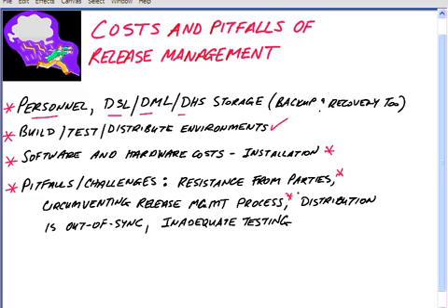For example, one business unit or one area releases the software or hardware weeks or months in advance of another business unit that can cause political problems, morale problems, personnel problems. And of course, the biggest pitfall of all is simply inadequate testing. You cannot test enough. You cannot create a too perfect prototypical environment to test out your hardware or your software